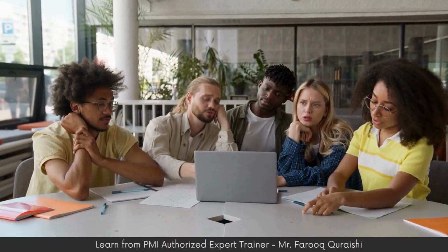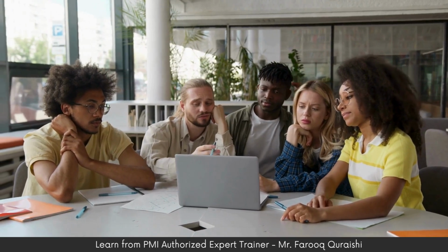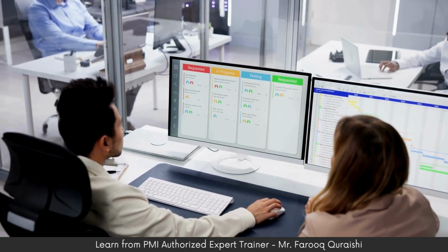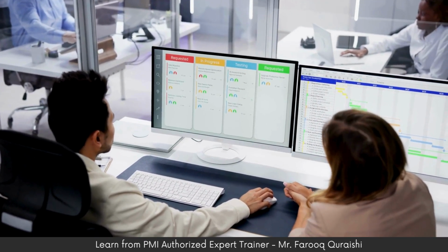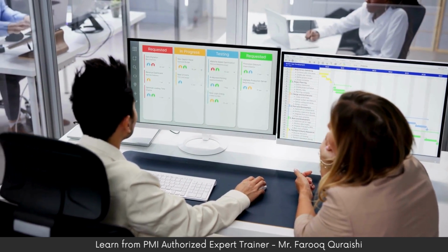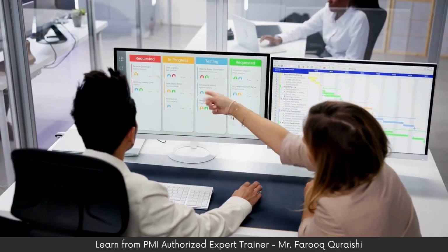There was a quality management plan prepared for the project. What all went right as per that? What went wrong or what needs improvement? And thirdly, if you're given a chance to rework that again, how will you do it? That is what you do in your traditional project, which you call lessons learned. Similar to that, you have the sprint retro in the Agile Scrum framework.